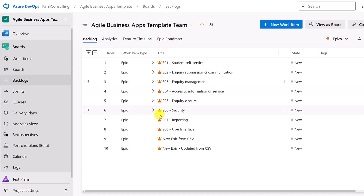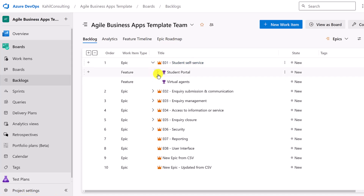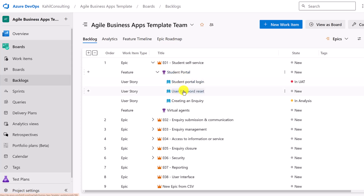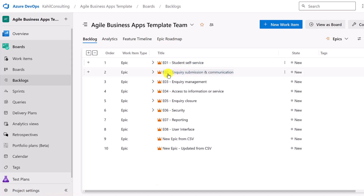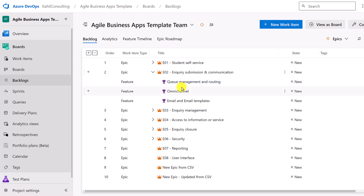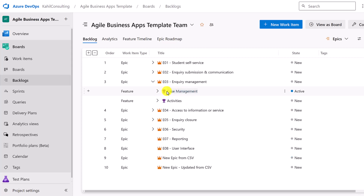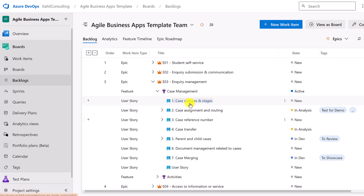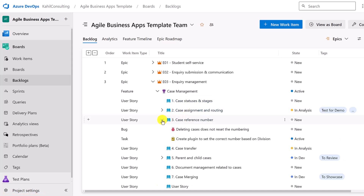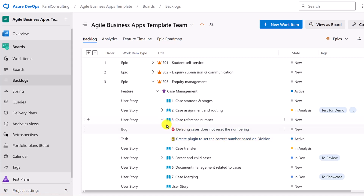Concretely, I've organized this product backlog in epics, features, and user stories. The epics represent the big stages of the system I'm implementing — in this case, an inquiry management system for students. The first stage is student self-service. Under that, features include a student portal and virtual agents or chatbots. The student portal has user stories for login, password reset, and creation of an inquiry. Under inquiry submission and communication, we have queue management, omni-channel, and emails. Inquiry management has case management with cases, case statuses, case assignment, and case reference. Each user story can then be decomposed into specific tasks, and bugs can be created under their specific user stories.